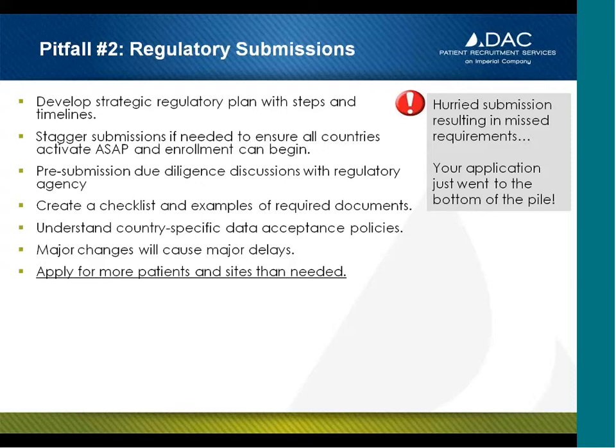And one of the things related to really patient recruitment and even site selection is apply for more patients and sites than needed. This is something that we always recommend, because frankly, if you have to apply for more sites later on, or try to add patients to the program later on in that country, it's often going to require an amendment, and that's going to set you back as well.